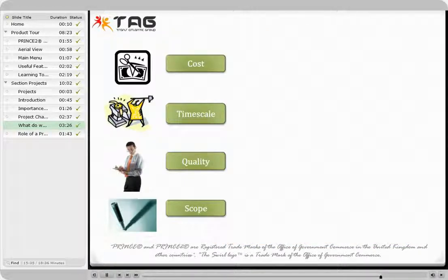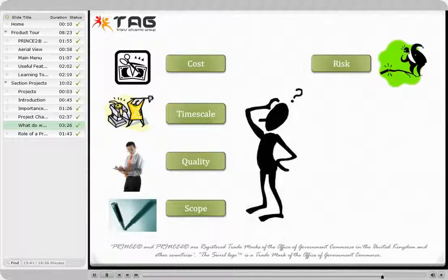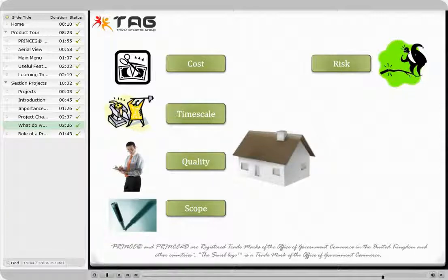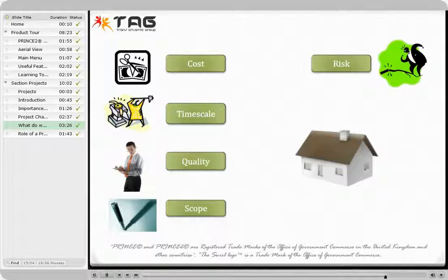In terms of risks, all projects entail risks. But exactly how much risk are we prepared to accept? Should we build a house near the site of a disused mine, which may be prone to subsidence? If we decided to go ahead, is there something we can do about the risk? Maybe insure against it or have thorough surveys carried out.